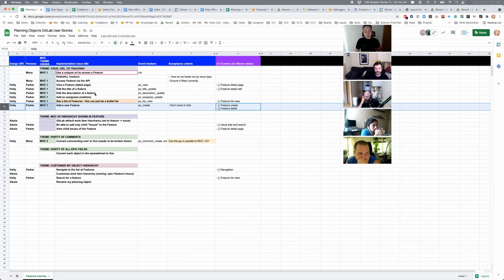Yeah, I guess this goes back to what John mentioned earlier: as we break this down to be more granular from an issue perspective, in terms of getting an accurate weight that provides an estimation of the effort, some of them would naturally be combined into one little piece of work. For example, editing the title and description is probably one chunk of work that is a 3 weight or a 5, but it sounds like from your perspective, it's better to have those broken down into 2 issues. They probably won't be weighted independently.